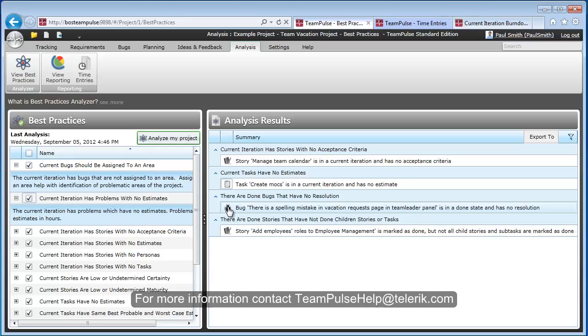From a best practices standpoint as to when you should run it, because this is the question that comes up a lot for us, we always tell our product owners or team members, run it while you're grooming your backlog. While you're prioritizing the backlog is a good time to run this. As you're prioritizing, you're working with those requirements, so let's see if you can catch any of these, and then quite simply make the corrections. More importantly, this will allow that when the requirement does get committed, you're not missing any of these little infractions that could create bigger problems down the line.